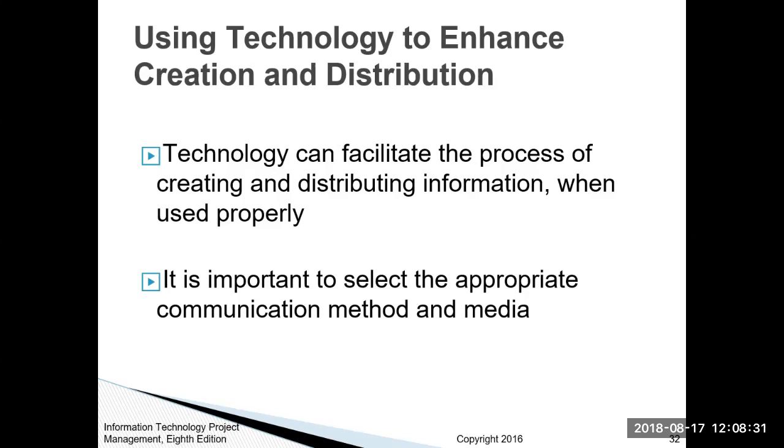Or, for example, if you have a project that requires researching and applying for different licenses or different permits through government agencies, you have to allow time for all of that to be processed. You can't just say, oh, I'm going to go down to the county office and apply for a permit and expect to walk out that same day. Can it happen? Yeah, probably sometimes, but don't count on it. They could turn around and tell you it's going to take a week or three to four weeks, however long they want to tell you, depending on what's involved.